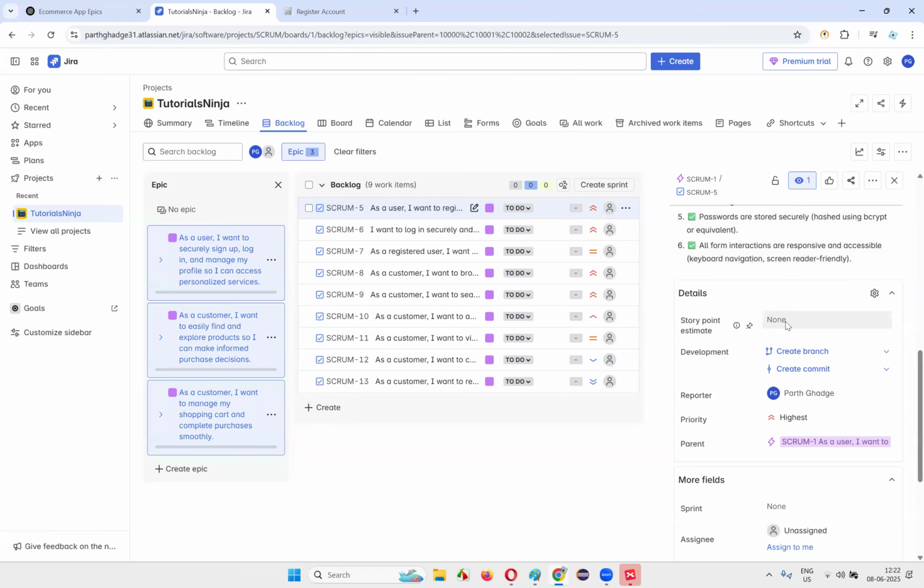The product owner, with his experience, is going to give some estimations here. How will the estimates be given, in what type of units will the estimations be given by the product owner? I covered this in the previous session, right? In what way the estimations will be given? Yes, it's in points. It's not in minutes, hours, seconds, or something. It's in points, guys. Okay. Estimations will be given in the form of story points, guys.